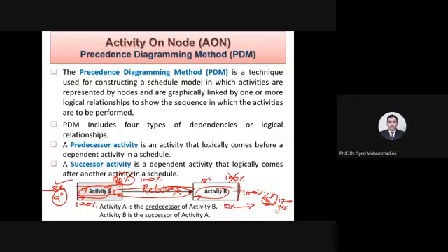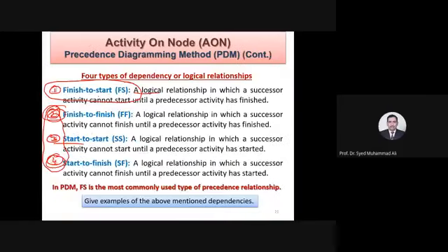تو ایم ایس پروجیکٹ میں جب آپ یہ ڈبل کلک کرتے ہیں اس لائن کو، دی ریلیشن شپ ڈائلاگ باکس اوپنس اور ڈیفالٹ میں ہوتا ہے FS. آپ اس میں کلک کرتے ہیں اینڈ یو گیٹ دی لسٹ آف FF, SS اور SF، جو بھی آپ چاہیں سلیکٹ کر لیں. اچھا سلیکٹ کرنے کے بعد اس میں ایک اور آپشن بھی آتی ہے کہ آپ اس میں کتنا ڈیلے یا لیگ آپ ڈالنا چاہتے ہیں.